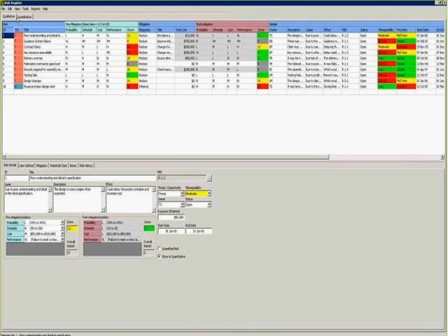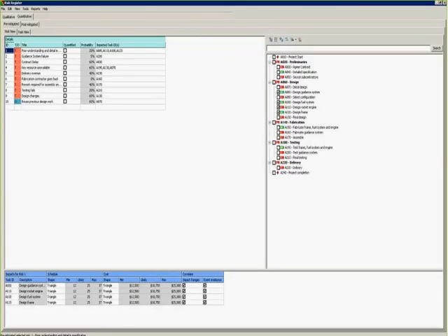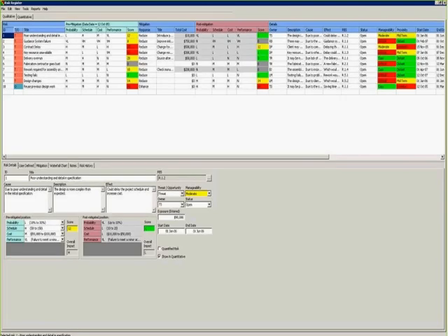The risk register provides two types of risk, qualitative and quantitative. The quantitative, we kind of showed you how we did that. We picked our distributions, we picked our tasks, we applied our distributions. Over here it picks it up and tells you what tasks have been quantified. Then there are qualitative risks, for example contract delays, delivery overruns, your fabricator goes bust. All of these are things that your SMEs are telling you could happen.